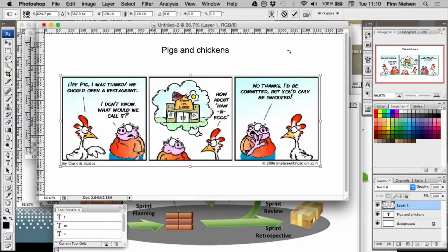So that's why we have a Scrum Master. So we have a guy who has to go up to the manager and say, you can't do that. If you want us to work on something, we can put it in the next sprint. You can put it in the product backlog, and we can do that. But you cannot tell my developers to work on something else now. And this would be the Scrum Master's job in this case.